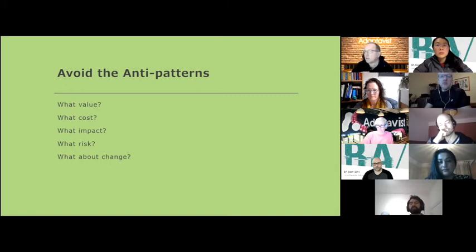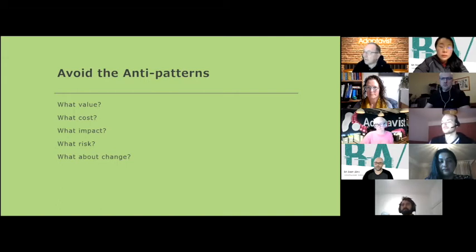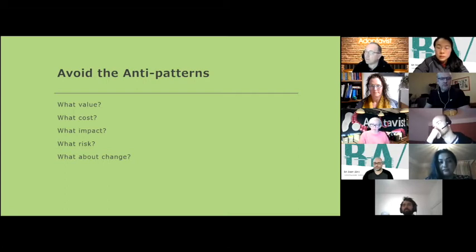So you almost need to compartmentalize your process into, how much do I need to capture now? Go back to manufacturing and use the just-in-time principle: capture enough to deal with what the requirement is at that stage in the process for that particular story. If it's just listed on the backlog, a title may be all you need. You might need more detail when you come to estimation. It's definitely going to need to be more fully documented when you come to committing to deliver.